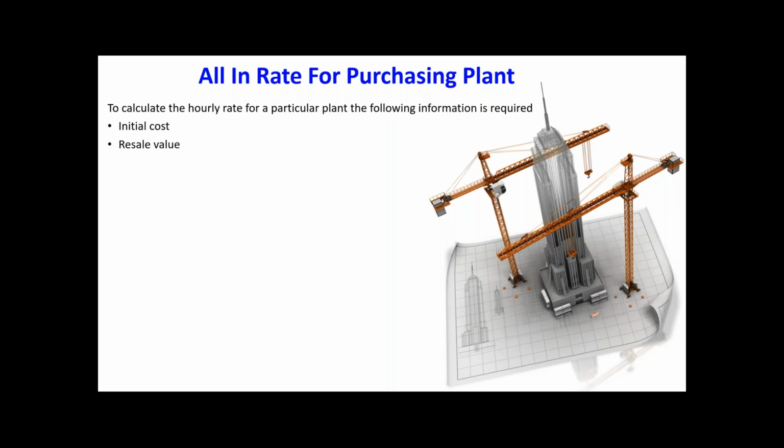Then you have to consider the resale value. Why do we have to calculate the resale value? Say for example, you are buying a car and you are going to sell it after 3 years. So what is the resale value after 3 years? You have to calculate it. Why? What is the purpose? We calculate the resale value to calculate the depreciation. Yes, how much it has depreciated, how much we are losing throughout the years. That is the cost we have to calculate.